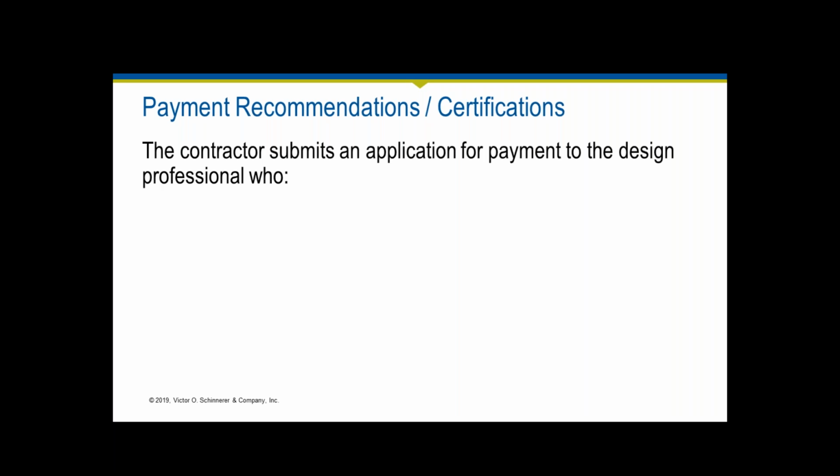The last thing that I want to touch on are payment recommendations. Oftentimes, you as a design professional are responsible for approving and reviewing payouts, and this goes along with your site observations. Once a month, you may have a payout. You need to decide percent complete. That's indeed a fairly valuable service to the owner, because they want somebody to tell them, yes, indeed, this portion is this percent complete, that portion is a different percent complete depending on the schedule of values, and that determines how much money should be paid.